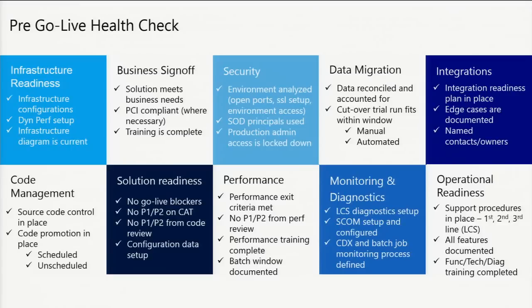If I missed something, I can address it in there. But it's really important that this becomes part of the plan itself and integrated into the plan. Okay, so infrastructure readiness, business sign-off, security, data migration, integrations, code management, solution readiness, perf, monitoring diagnostics, and operational readiness. And believe it or not, that last one is one where we see customers aren't ready.